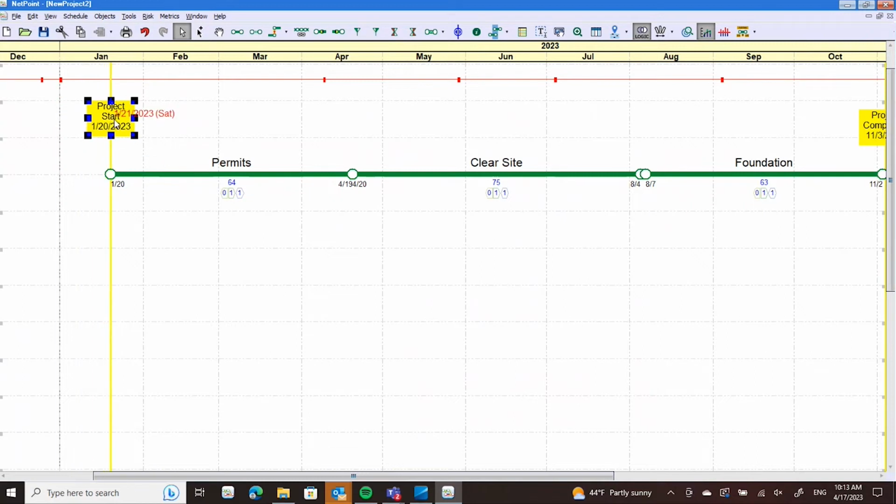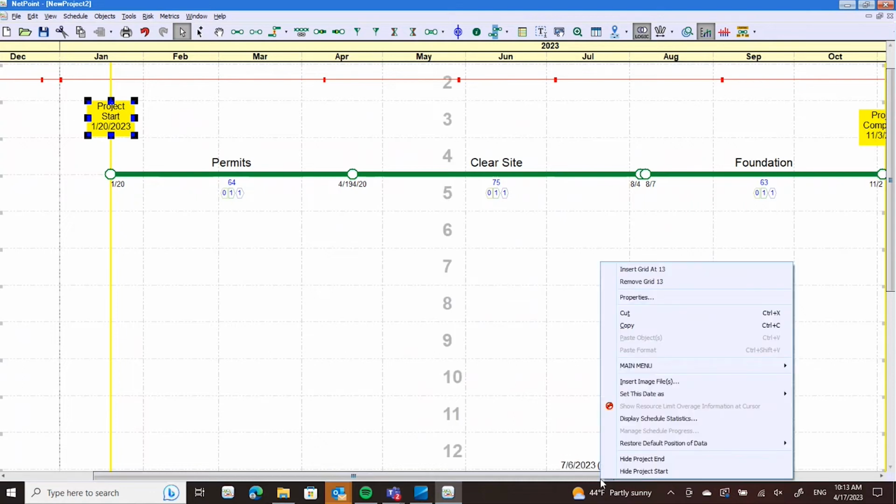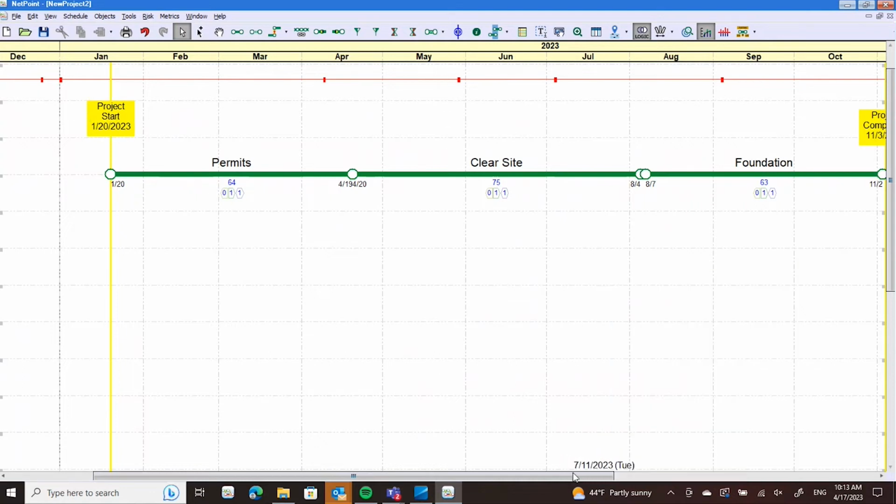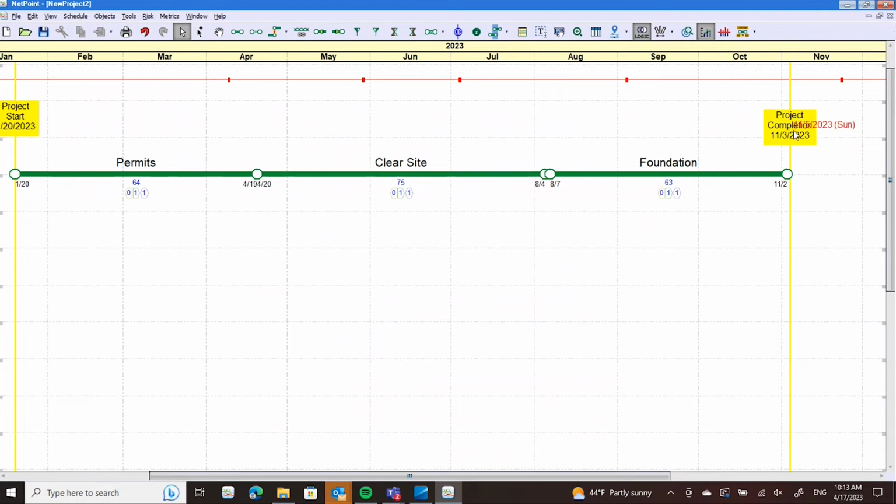If we bring this up to that date, so the project starts on project start, and project end, project completion, we'll bring that back a day. And then, oh, I brought it back 2 days. No good. There we go. So now we've got triple zeros under all the activities. It's critical path, and it runs from project start to the project finish.